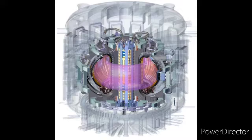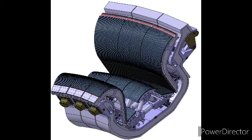The DEMO design needs to migrate from the present pre-conceptual design to a conceptual design by 2020. This will happen after a stage-gate review around 2020, in which a number of less promising design options will be deselected. On the critical path for DEMO, and in fact for any fusion reactor, is the construction of a 14 MeV neutron source. Ideally, the start of the DONES construction should take place early in the 2020s.